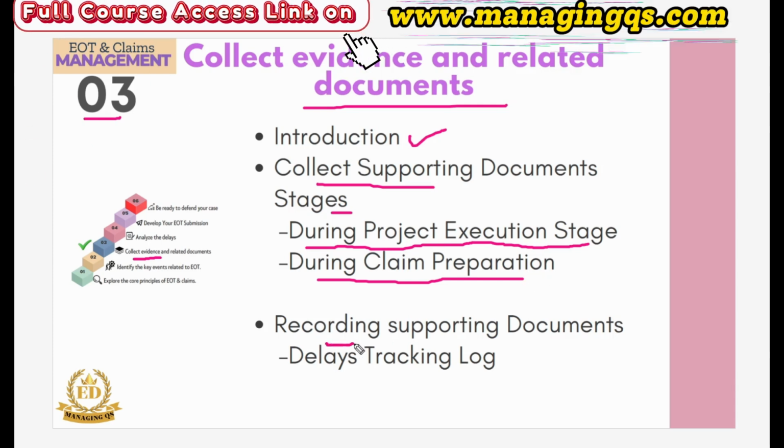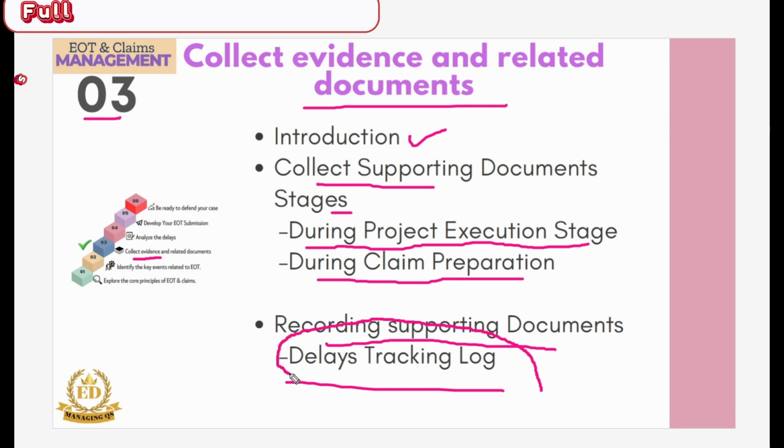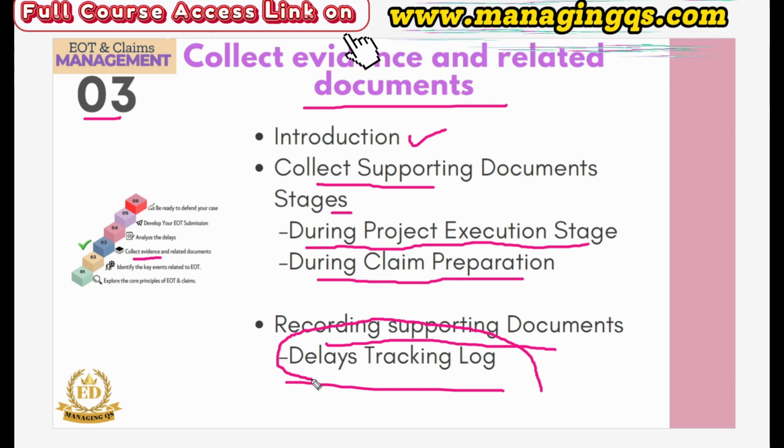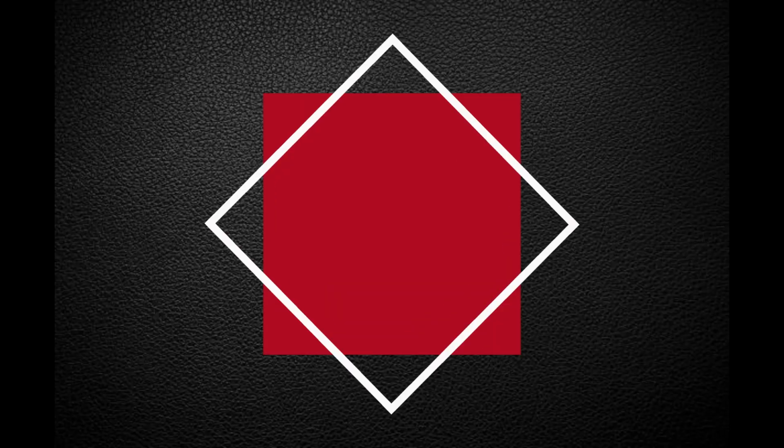The final thing is recording the supporting documentation into our delay tracking log. This is one of the core important tracking logs for each and every event's delay. So these are the items it will cover under this step 3.